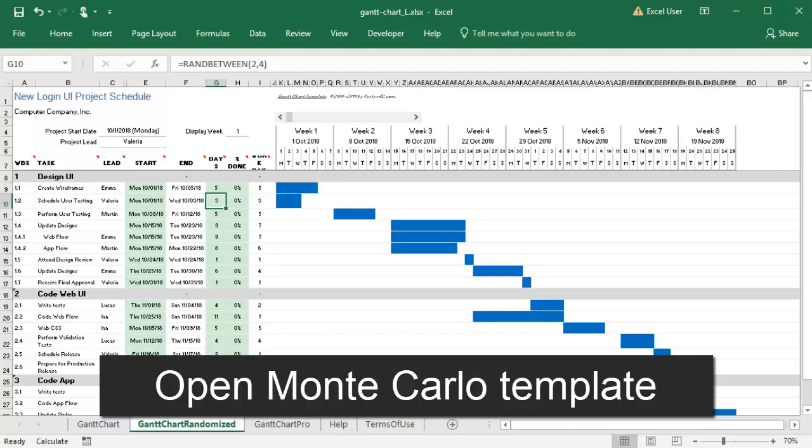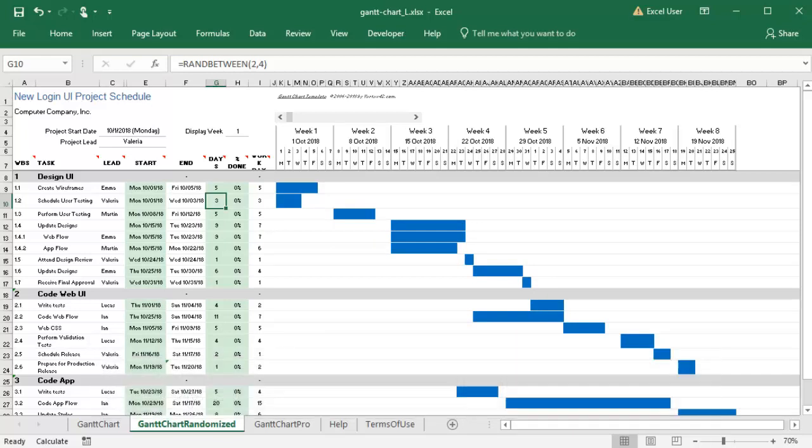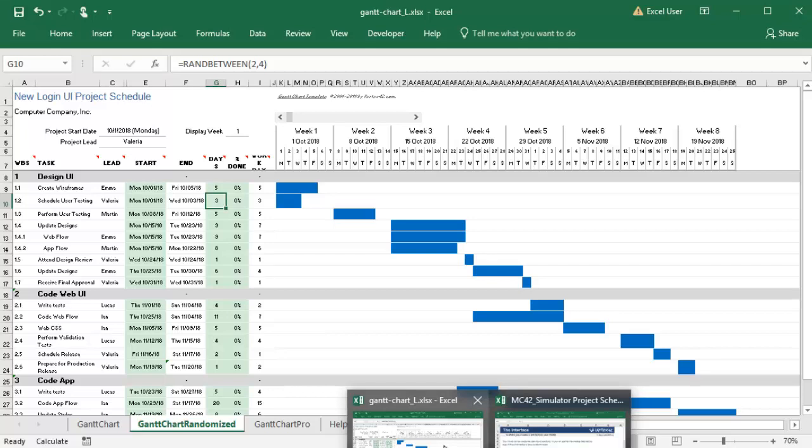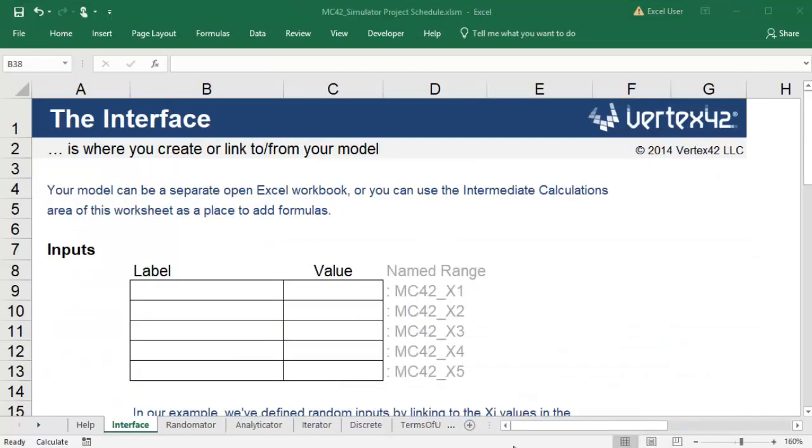I can use a Monte Carlo simulation to run through a lot of different possibilities. It will recalculate the Gantt chart many times and will read in my project end date each time it recalculates.